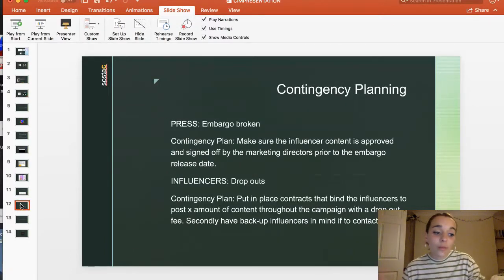Unfortunately, not everything can go to plan, so we need to think about contingency plans. These are just two of the ones that we've come up with. So we've got the press releases, and on the press release there is an embargo on the November the 2nd. The contingency plan being to make sure that the influencer content would be approved and signed off by the marketing directors prior to the embargo release date, purely just in case the news publications decide to go ahead and break our embargo.